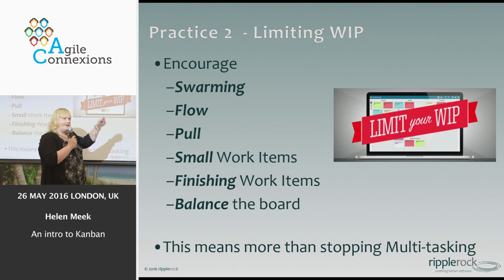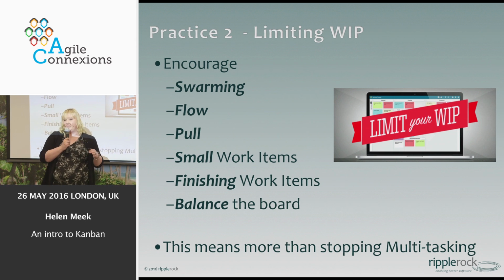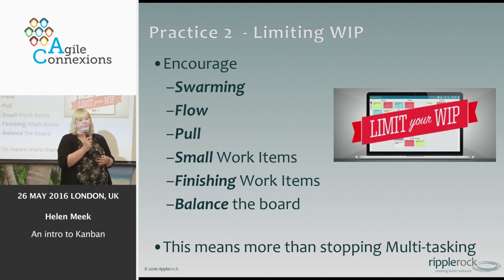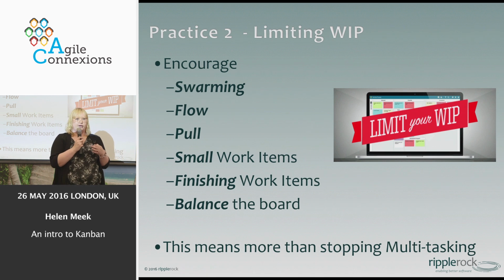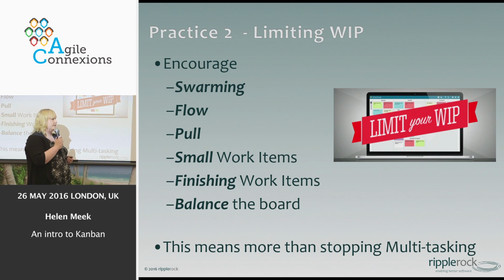Do you remember on my visualization I had my WIP limits at the top and they were pretty much 3-3-3, which tells me I've got a bit of a balanced system. I also gave you an example where I had way more developers than testers, which means all the testing work bottlenecked in the buffer. So that told me I had an imbalanced system. So what you need to do is make sure you have the right ratio, and there's no golden number of devs, testers, BAs. It's only through experimentation that you're going to work out what those numbers are. Ultimately, you need work flowing smoothly because waiting time is costing you money. People put it down, pick it up, they look, they send reminders, no, it's not ready. Every time you do that, it costs the organisation or the client or whoever money. So it's important that we make sure that work flows.